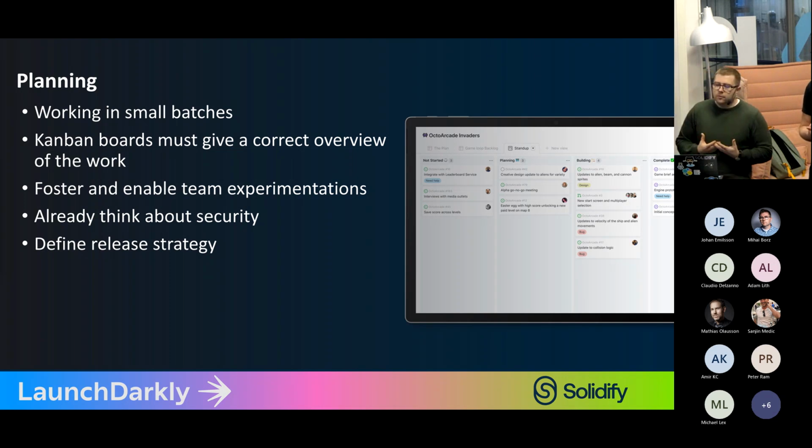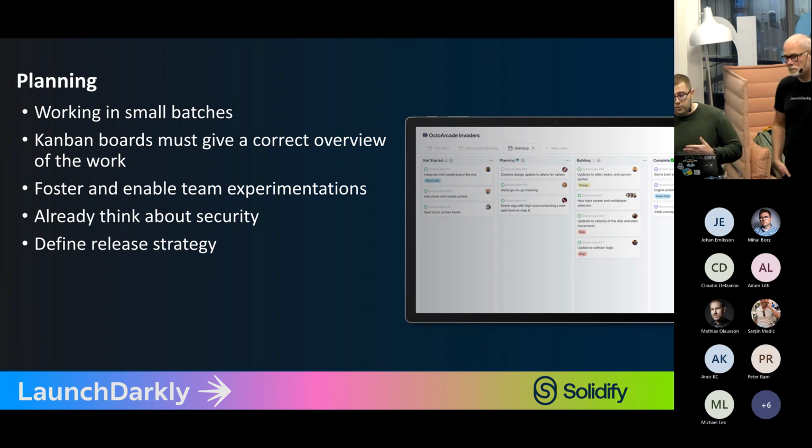We should decompose into smaller features instead of working on a long feature branch. We can split a complex feature into much smaller ones for rapid development, and then we can deliver them, get feedback, adapt, and continue. This will result in faster feedback and more satisfaction.